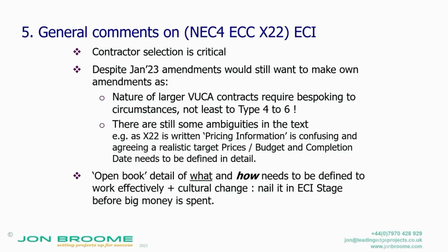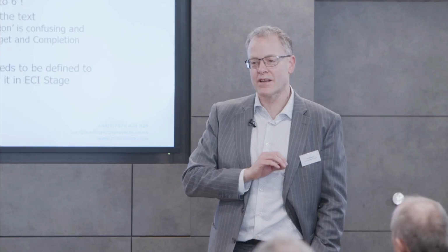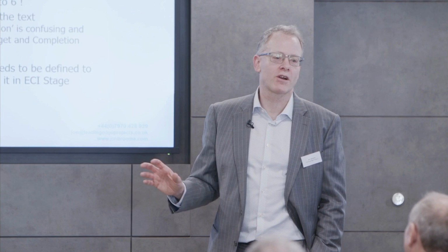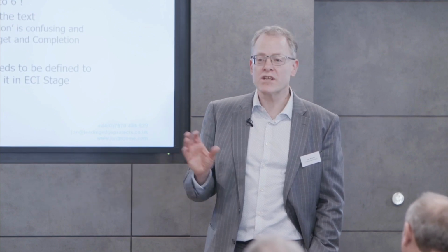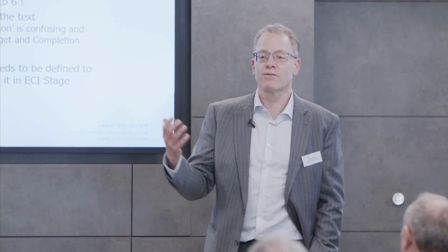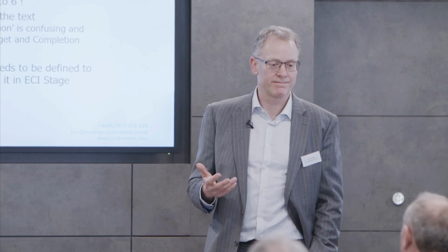And the other thing with any target cost contracts, I've seen it done well. I'm not going to say it's easier than doing activity schedules, no way. But if it's done well and set up correctly, and the key is in setting up correctly, then it can be relatively pain-free. On the other hand, I frequently see it done badly to appallingly, and it just becomes a bureaucratic quagmire, which the client is paying for twice, because you're paying for the contractor to bring forward the evidence and you're paying for your PQSs to administrate it.